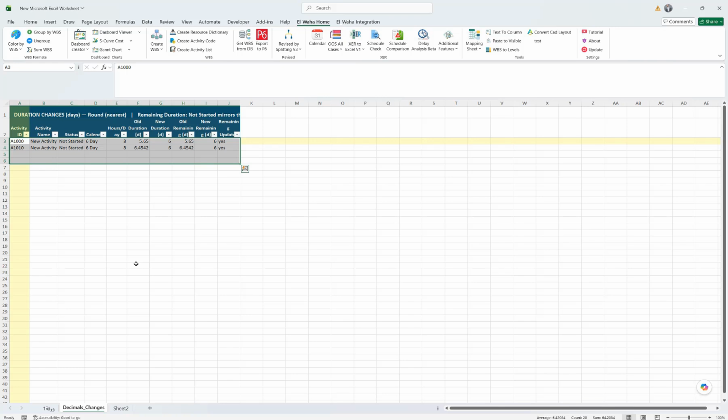You might say, but engineer, what about during Ramadan, for example, when we have a 6-hour workday? You have to close it, make the 2-hour break if you are forced to do it. Unfortunately, you have to do it in the middle of the day. Otherwise, it is very likely that the same problem will happen again. That's on us. Of course, after you finish, the tool will leave the old XER file as it is and create a new file for you.